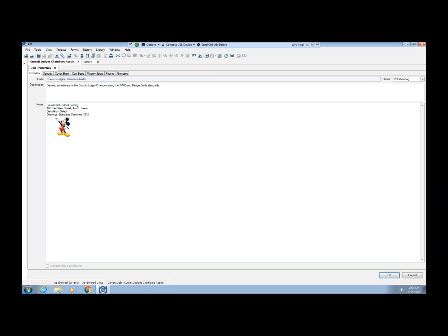We put in the area cost factor at the time of the estimate for that location. We'll put in the date of the estimate. The database really is generally RS Means. We'll add a note if we had quotes. We'll get some of that most of the time, so we'll put that in there. But most of the estimates are RS Means data set, or quotes, or experience, or calling around, wherever we can find it, we'll document it.